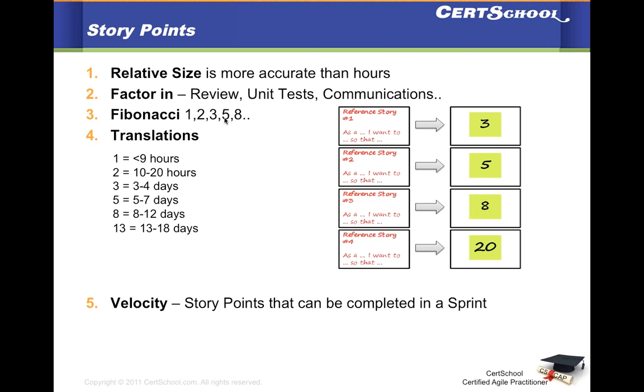User stories, we've talked about it a few times already in past webinars. So you have a story and you're trying to estimate, you do some analysis. Instead of trying to come up with an absolute days analysis, you come up with a story point number. These are all relative. So 2 is obviously greater than 1, 3 is greater than 2.